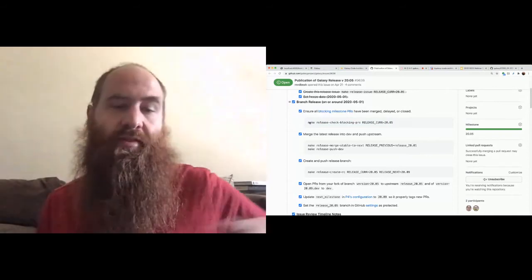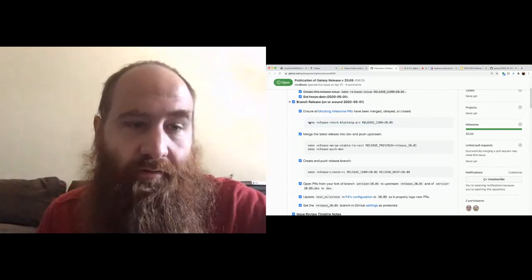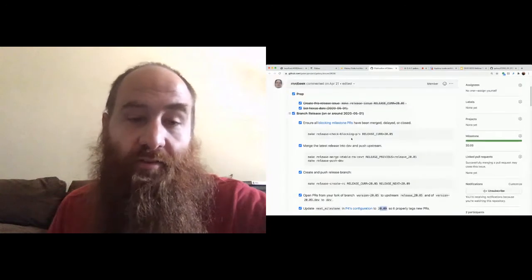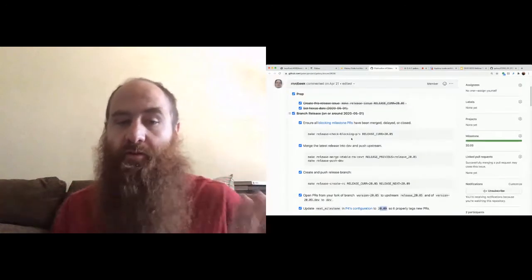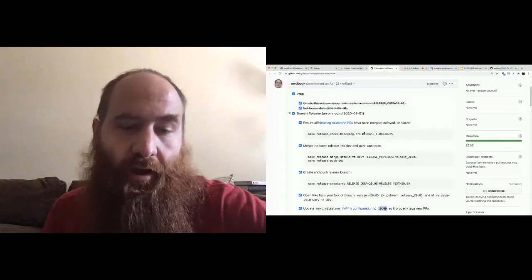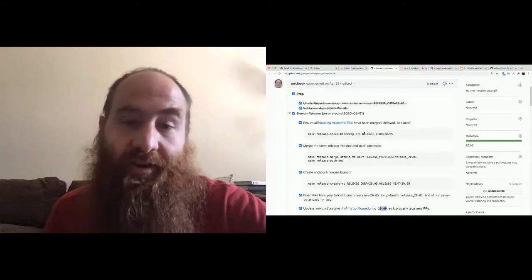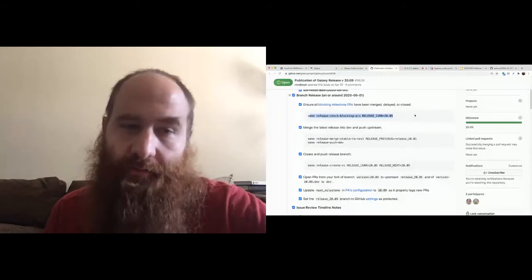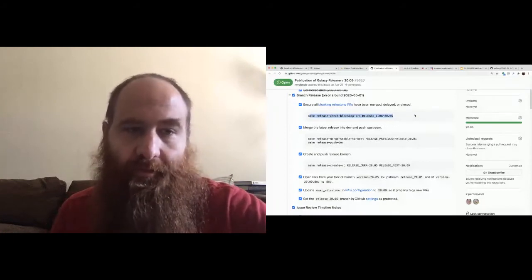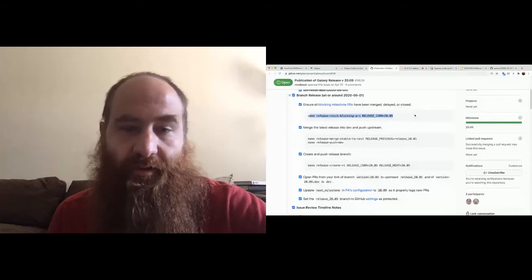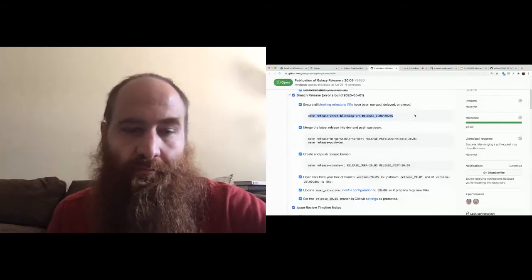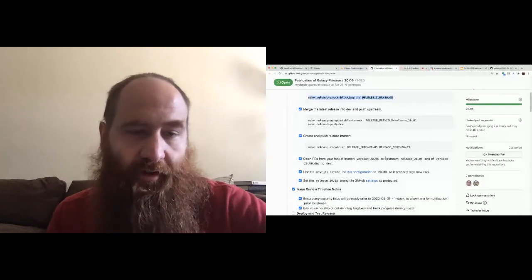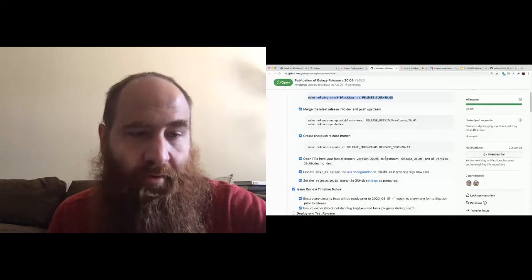And that doesn't mean they all are merged in 2009. As part of ensuring there are no blocking PRs, sometimes that just means pushing off PRs we're not ready to merge yet to the next release. So there are no promises like, if I get my PR done in April, that it will be in May's release. There's just no promises there. PRs are scary. They can break things.